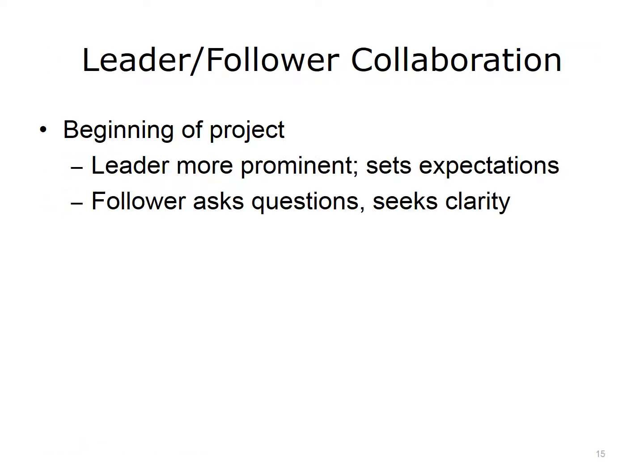At the beginning of a project, sometimes called the planning stage, a leader may be executing strategy already set forth by a board of directors or a senior leadership committee. The leader, at this phase of the project, is often referred to as the project sponsor and is leading primarily from a document called the Project Charter, which spells out the activities that are within the scope of this particular project. The leader's visibility is crucial during this period of time because the followers need to understand that the project has the full support of the leadership of the organization.